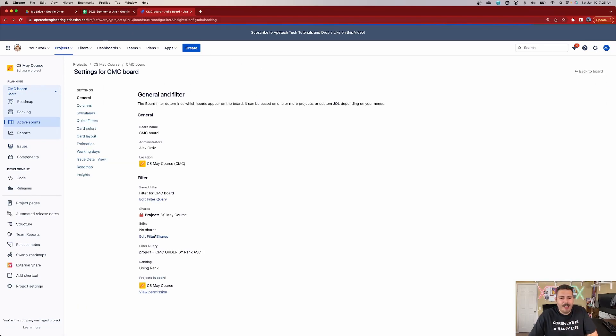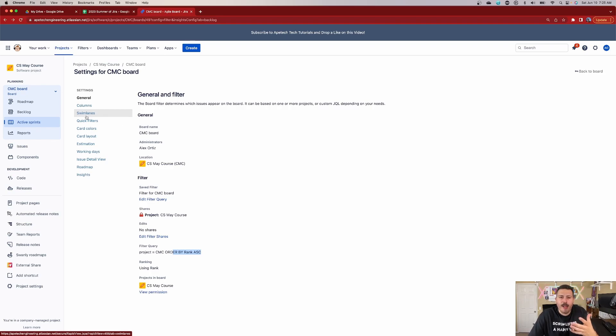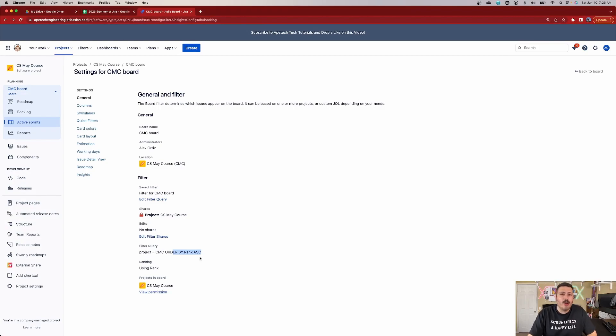We already talked about edits — basically who can make changes to the filter. The filter query shortcut is just showing you what's in the filter query without having to click on it. The 'using rank' setting is very important — it's dictated by your filter query and you can see that it says 'order by rank.' Your order by rank is what allows you to rank your backlog and shuffle items around. You could alternatively order by priority, but you lose your ability to rank and move things freely. You can't have both — you have to pick one or the other.